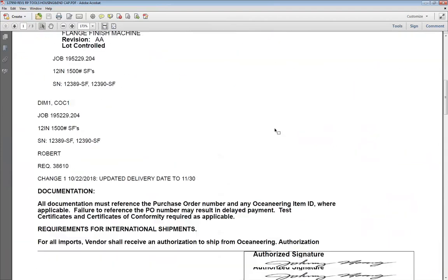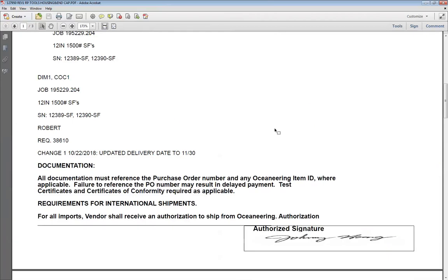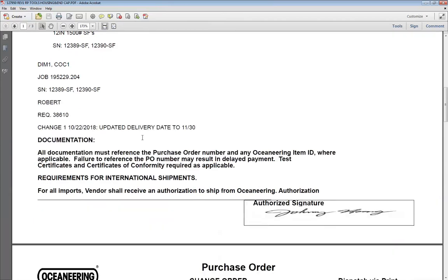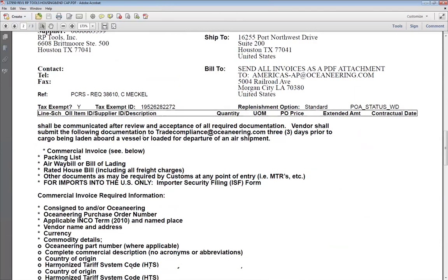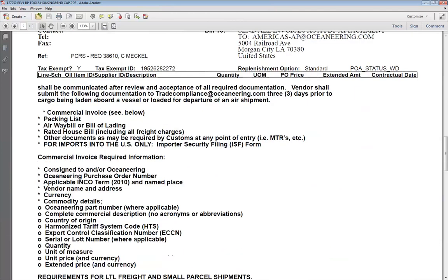Also, PO becomes the catch-all for us. So things which are not captured on the drawing or things which are special, because we sometimes take existing drawings and then we want to put NDE on it, and it becomes part of the PO. So as a PM, it's important that we review the requisition because the requisition has all those details. They automatically just are pasted on the PO. Right? So when you approve a PO, you're basically saying, I'm agreeing to it.